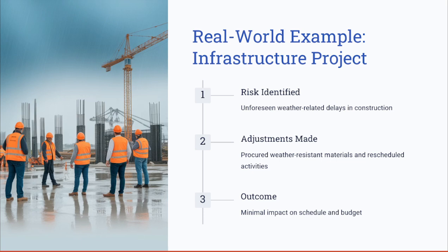Additionally, they could increase the workforce to recover the lost time. So this proactive adjustment to the risk responses has minimized the overall impact, keeping the project on track and within budget.